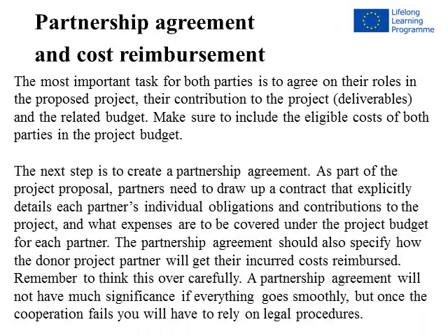The next step is to create a partnership agreement. As part of the project proposal, partners need to draw up a contract that explicitly details each partner's individual obligations and contributions to the project, and what expenses are to be covered under the project budget for each partner. The partnership agreement should also specify how the donor project partner will get their incurred costs reimbursed.